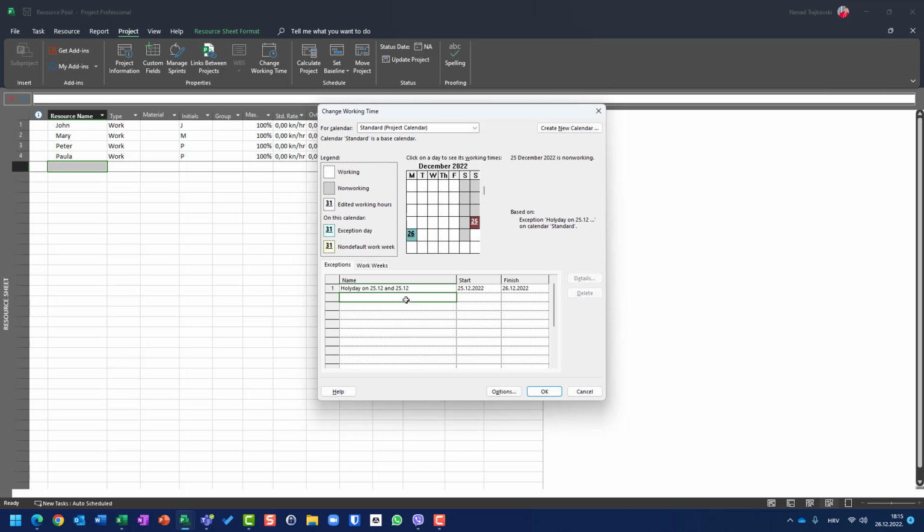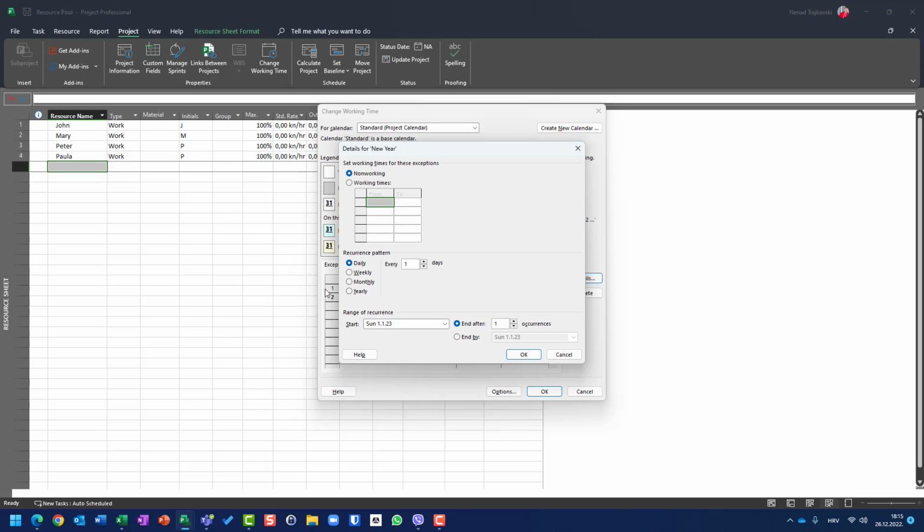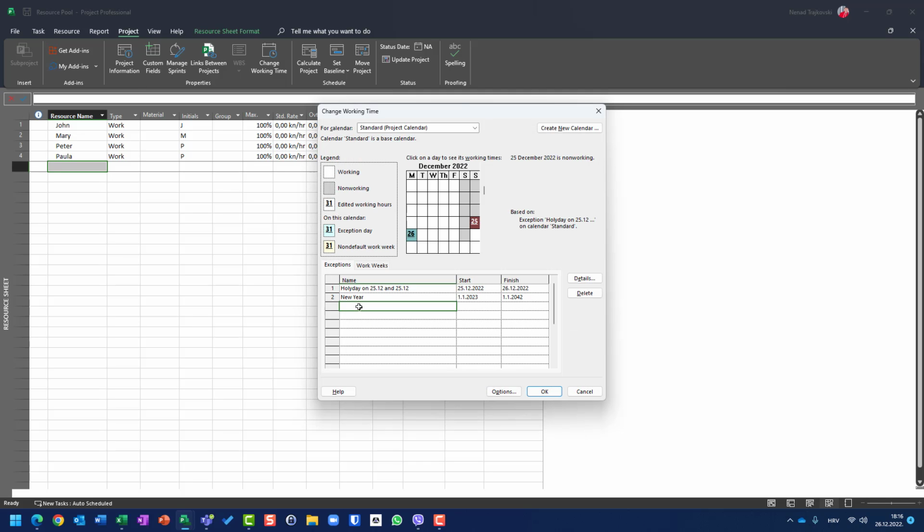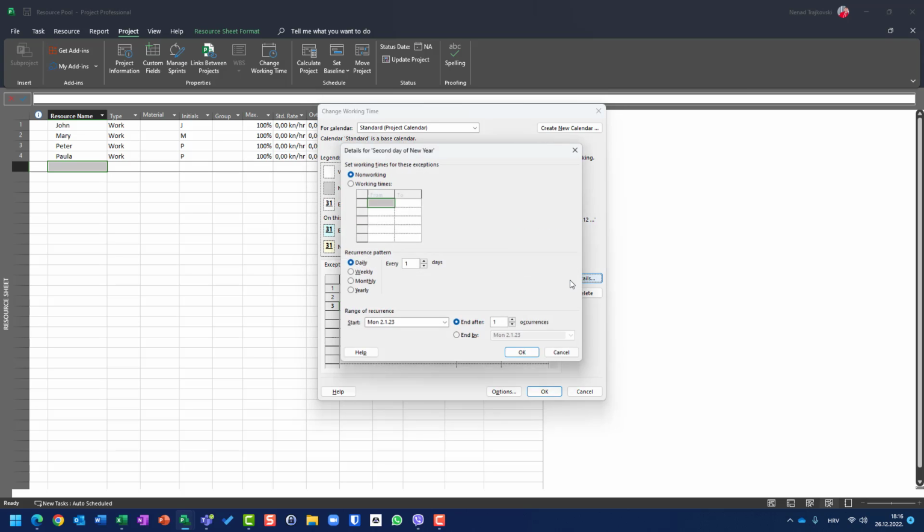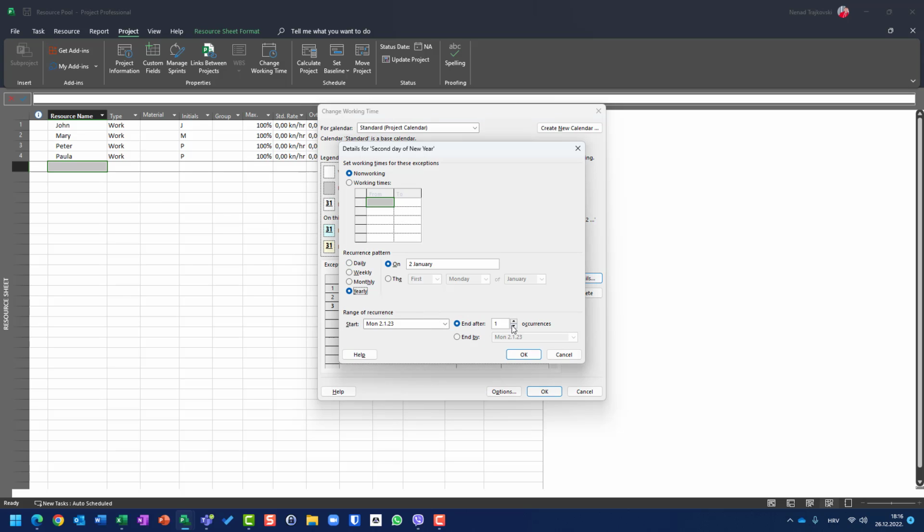And I can say, okay, New Year, and I will say it is 1st of January, details, recurring, yearly, and after 20 occurrences. And I will say, okay, let's say 2nd day of the New Year, because a lot of people are on their vacation then, so a lot of companies, so I will say, okay, details, recurring, yearly, let's say 20.